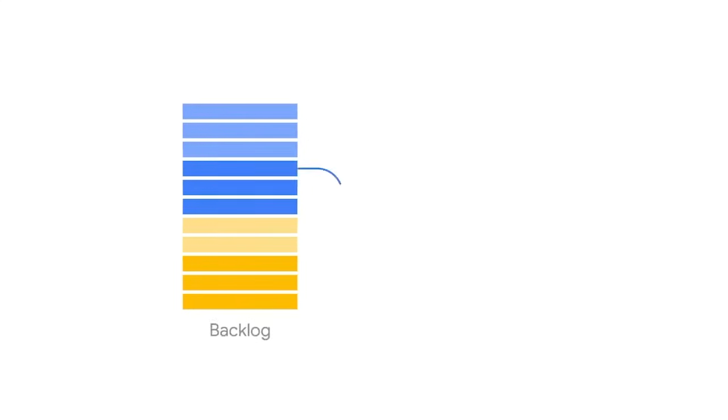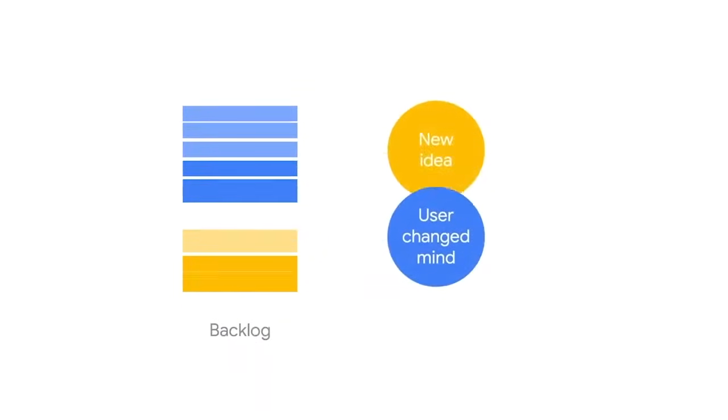In Agile, requirements are treated as more dynamic and expected to change as the team receives feedback and new information. There is usually an initial set of requirements or feature ideas when the project kicks off, but that list of requirements and features is continuously growing and changing throughout the project. The team works with stakeholders to prioritize the requirements, always moving the most urgent or valuable items to the top of the list. Then, the team goes down the list, working on the requirements in iterations. By going down the list, the team is able to get feedback on their work quickly and frequently. At the end of each iteration, the team gets feedback and can make necessary adjustments to the requirements before continuing on.